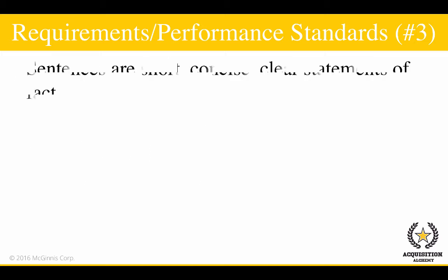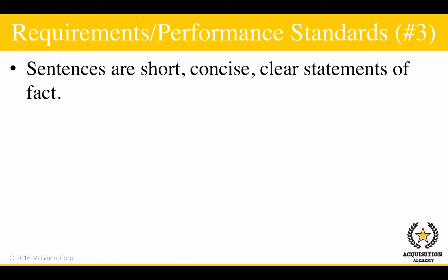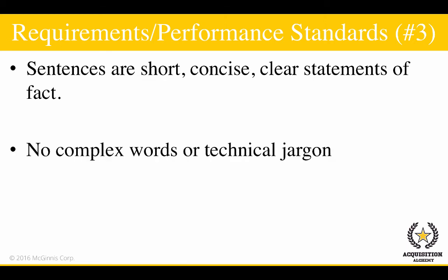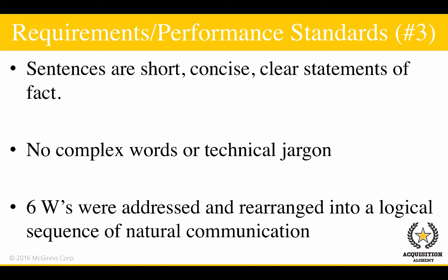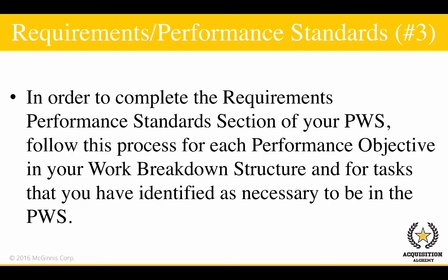As you see, sentences are written as short, concise, and clear statements of fact. There are no complex words or technical jargon. The 6 W's answers were addressed, and the sentences were rearranged into a logical sequence of natural communication. In order to complete the requirements/performance standards section of your PWS, follow this process for each performance objective in your work breakdown structure, and for tasks that you have identified as necessary to be in the PWS.